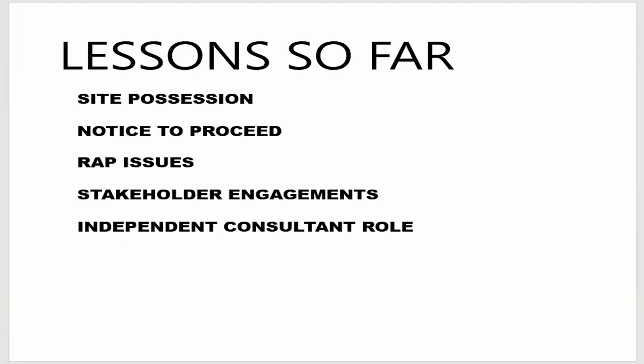Our major lesson is on the notice to proceed, because on a lot of the sections we've not been able to issue notice to proceed almost 1.5 years down the line, because as usual, our RAP issues, the payment, the verification is taking us so much and giving us so many issues that without resolving the RAP issues, we are not able to issue the notice to proceed.